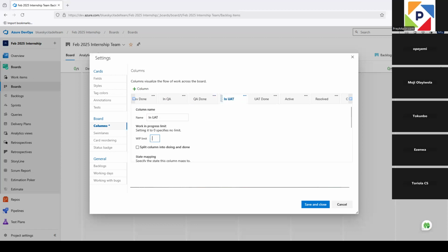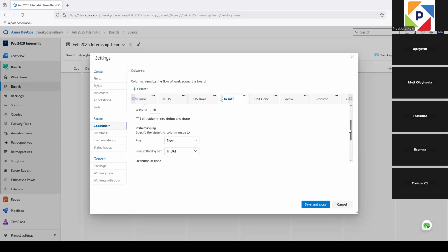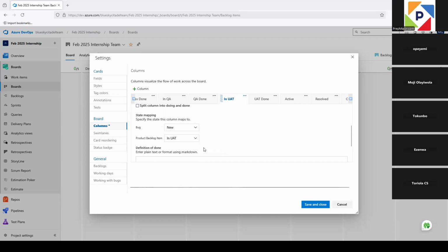Okay, so once I scroll down there, I'll tell you. Normally, once the bug has been closed by the QA, like I said, the QAs don't move the bug into UAT. You don't do UAT on the bug. BAs don't do UAT on a bug. What UAT means is you're testing the acceptance criteria to confirm that it is passing. That is what you're testing, and there's no acceptance criteria in your bug. So what they do testing on is actually this.